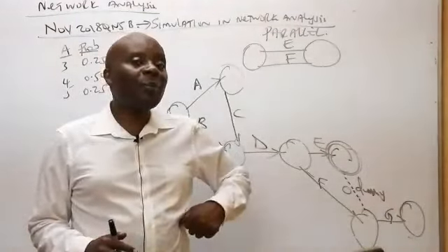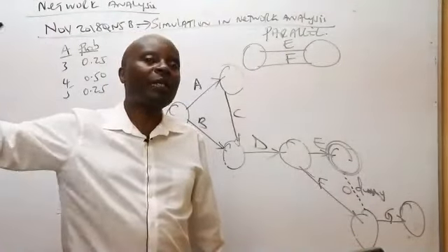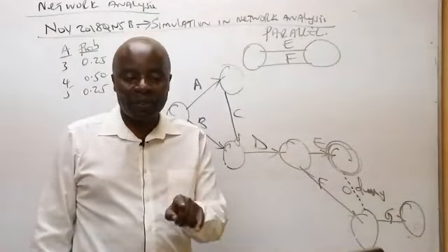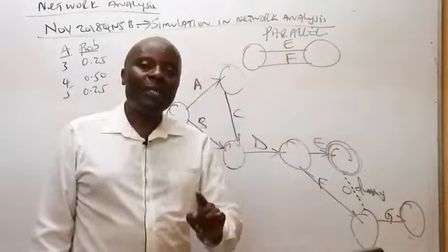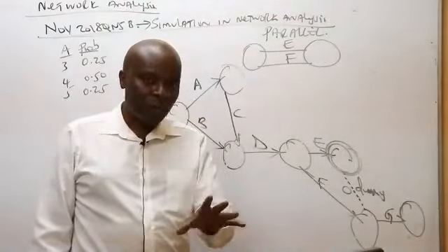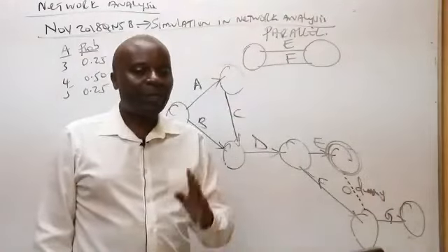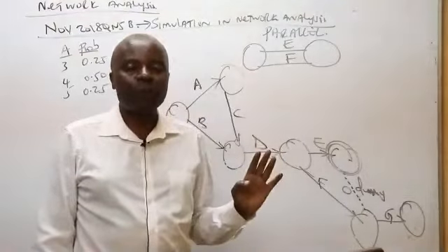Another student who is very bright will come and tell you that expected time is (A + 4M + B) divided by 6. Ladies and gentlemen, I would have done that if it were that kind of problem, but that's not the way here. Here, there is nothing like optimistic, there is nothing like pessimistic.